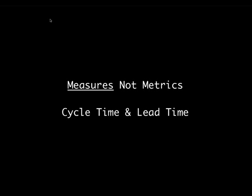I view cycle time as a prompting metric. We're going to analyze why this is taking 10 days. Then we get into special case variation and common cause variation — is it inherent to something we're doing? Is it that we're innovating, and there will be variation when a feature requires innovation or learning? Or is there something going wrong — a tool failure, a failure in a method, something we can address and eliminate?